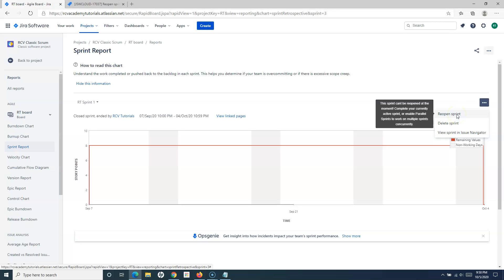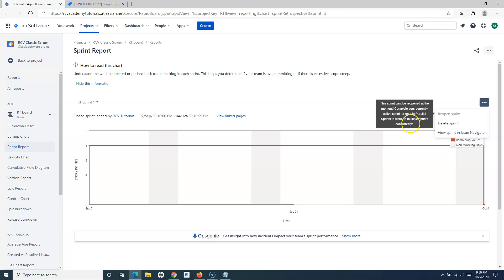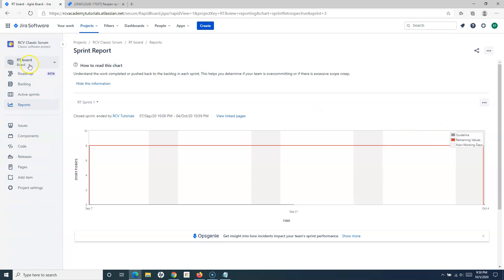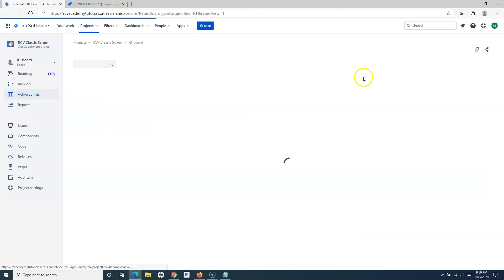You have the 'Reopen Sprint' option there, but when you hover over it you can see a pop-up saying: 'This sprint cannot be reopened at the moment because we have an active sprint already.' So either we have to close the active sprint, or we have to enable parallel sprints to work on multiple sprints concurrently.